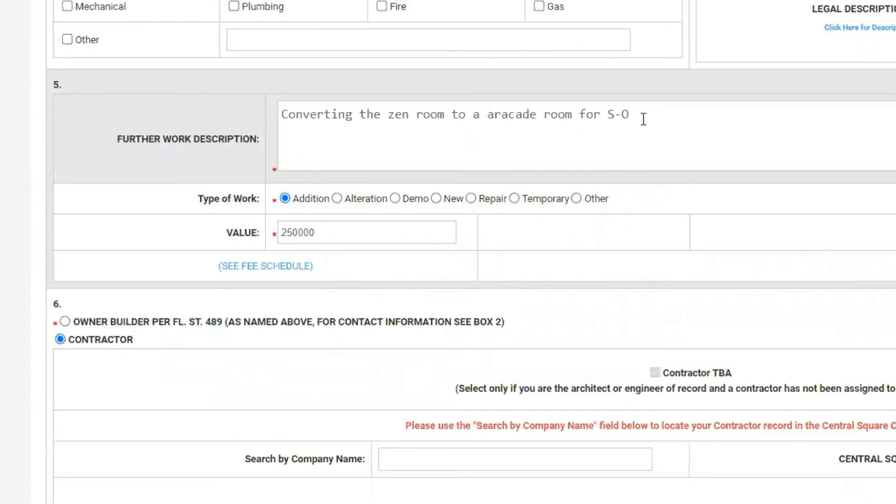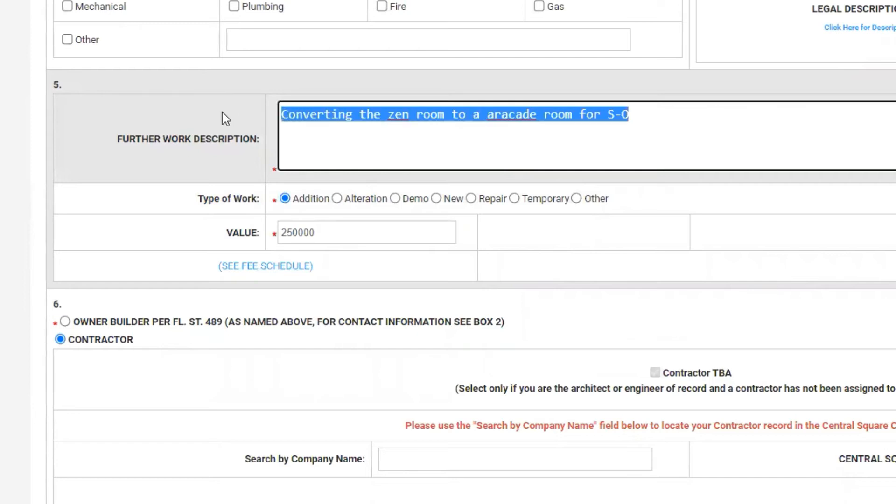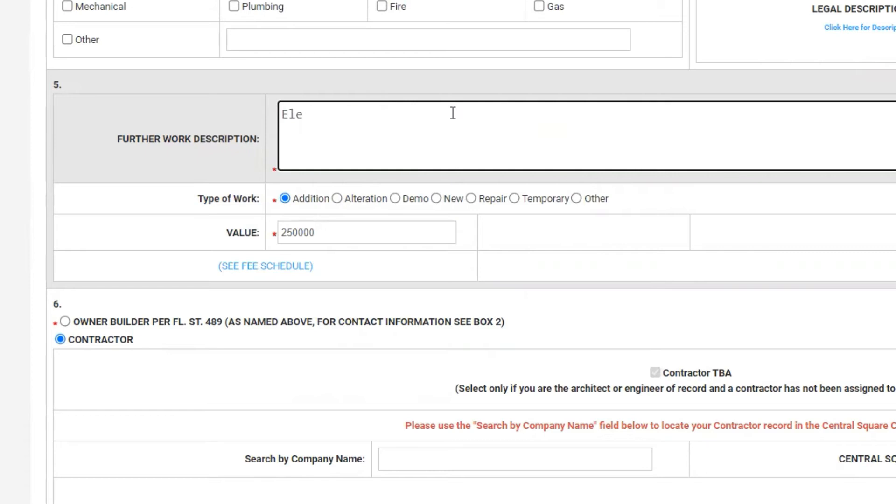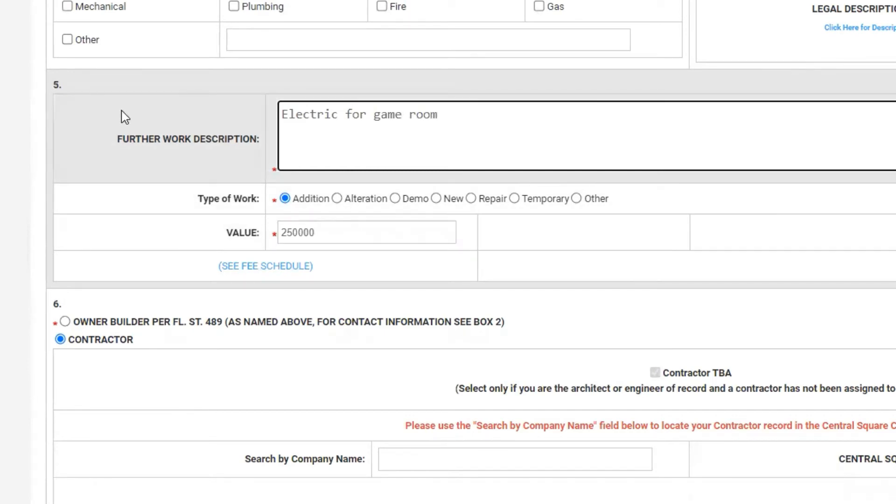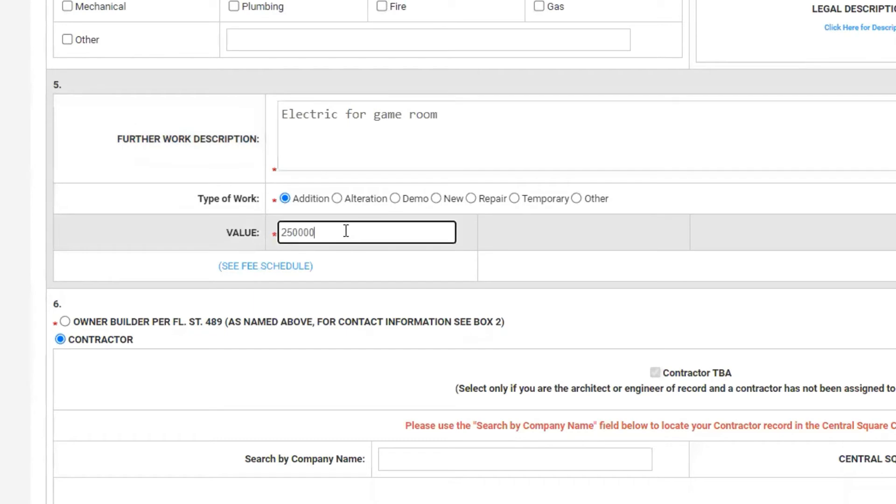Now for the further work description, I want to put the scope of work that's going to be done under my sub-permit. So we'll put here electric for game room. In this same box five, the value here should be changed to zero if my value for the work being done as a sub was included in the master project.